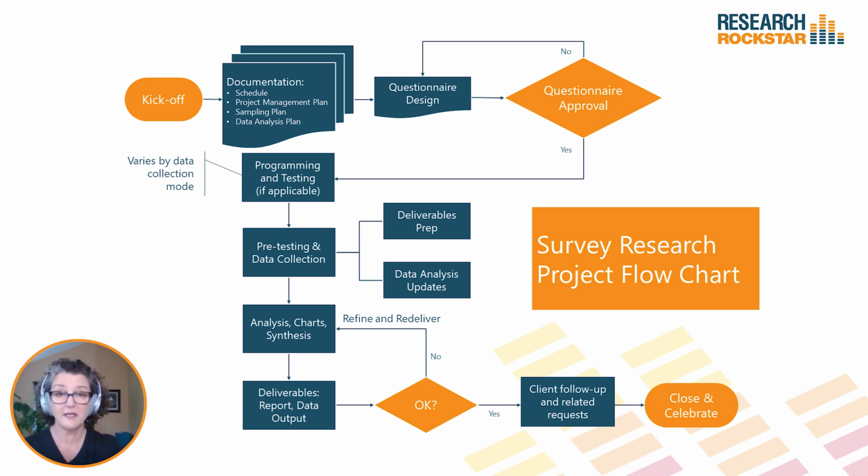Again, there are definitely cases where it can be far more than 5 days. But during that data collection time, we often want to use it to catch up on a couple of other tasks. While we are in the field, as we like to say, one thing is we start preparing the deliverables. It's a good time to jumpstart getting that report template put together, making sure that some of the early sections of the report can be roughed out. While we don't have our data yet, so we can't really do any writing or a lot of chart creation, we can probably get some basics in.